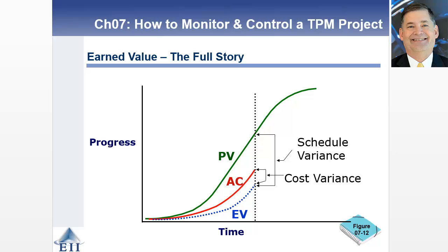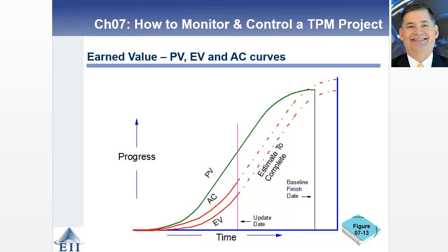If you plot these out to the future, assuming that the lines remain on relatively the same curve, you can again look at where this project is going to end up. And it looks like in this particular case, your cost is going to be above what you planned, but you may have a reserve associated to address that.